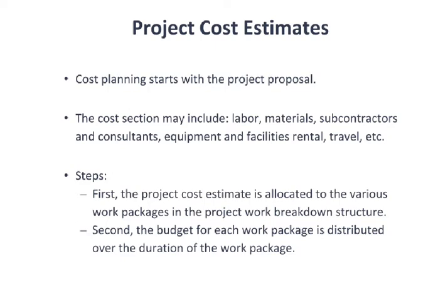Now, what we have to ask ourselves is, can we assume that that money is evenly spent? So 15 days, $15,000, is that $1,000 a day? Or is there going to be $10,000 spent in the first 2 days and then much less spent in the next 13 days?